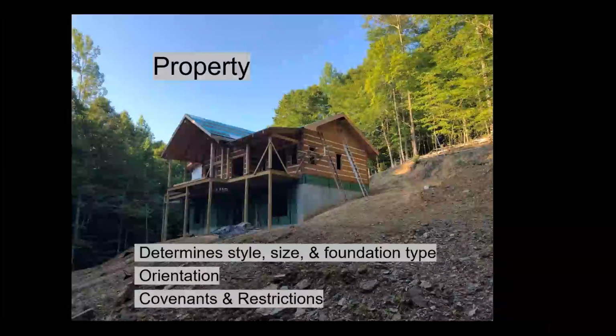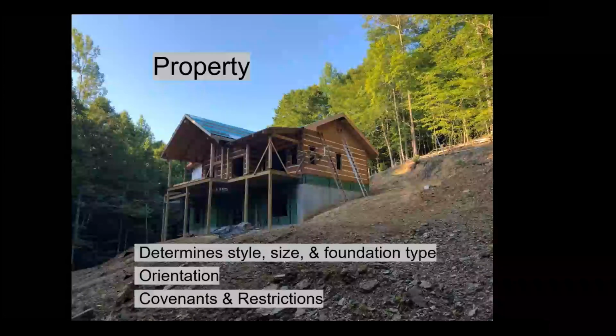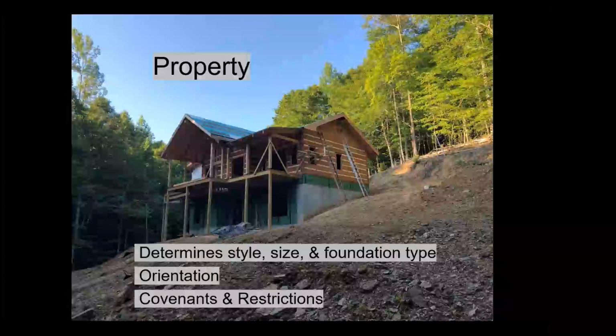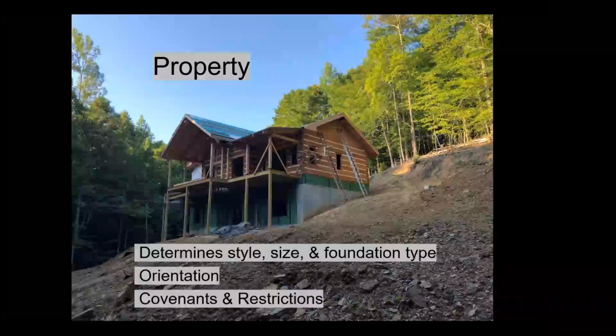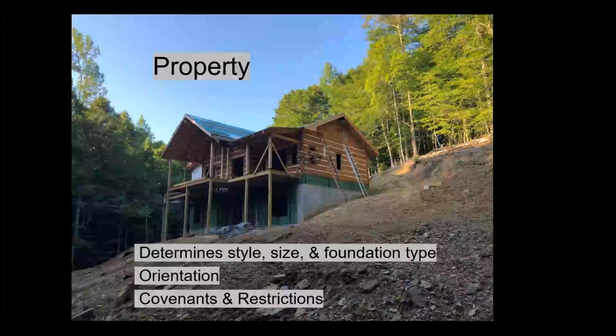That's been a big headache a lot of times over the years. People aren't fully aware of what restrictions they have when they purchase a piece of property, and they get into the approval process and they're required to change or alter things about their design that they really don't want to do, or they have to enlarge their footprint, which increases the budget that they weren't planning for. Things like that, so always be watching out for what kind of guidelines the development is trying to set for you.